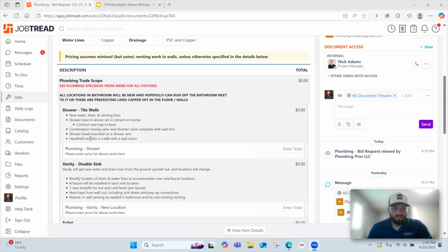Okay. So here, I'm assuming this is kind of what you're talking about. One of the things we did when I created this document is you can see everything is at the group level. And then I just said down here, here's one price. Maybe I can show you in the estimate. I estimate this with about 5 different items to get my actual price for plumbing the shower, or 3 different items. When I pull everything in here, I delete the 2 items that I don't need, and I just pick one arbitrarily, because if I'm job costing by cost code, it doesn't matter which item as long as you know which item and you make sure that everything that you can control gets pushed to that item.